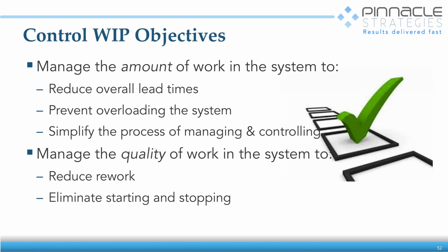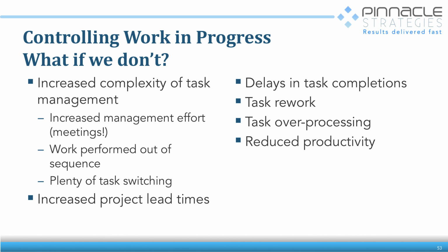So when we think about the two things that we're managing here, one of them is the amount of work, the volume, so make sure our freeway doesn't get overloaded, and also the quality of the work. Can people actually work on it? And to eliminate rework and eliminate one of the causes of starting and stopping, which is typically incomplete packs.